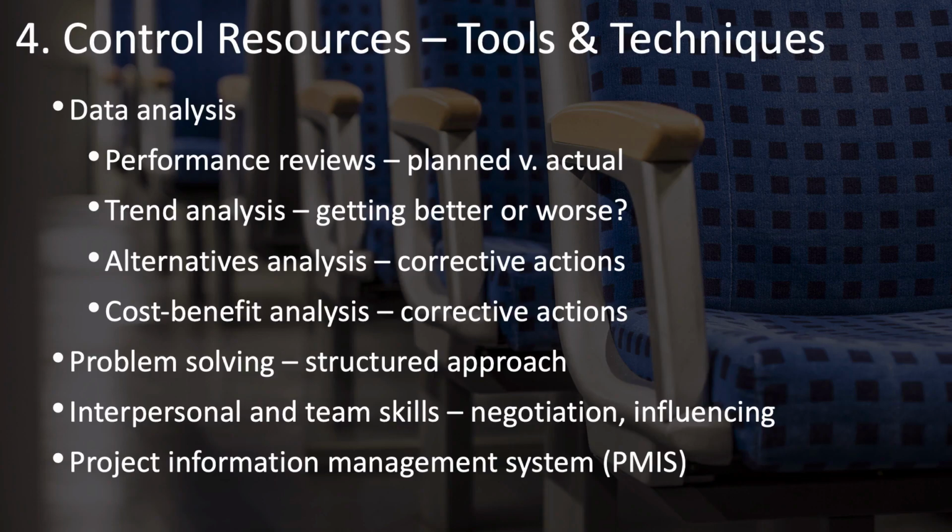As you do these forecasts, you may decide that you need to take some corrective actions, and so you'll use alternatives analysis to consider different possible corrective actions, and comparing alternatives such as, are you going to increase costs in order to get done on time, or are you going to delay the schedule in exchange for not having to increase costs?